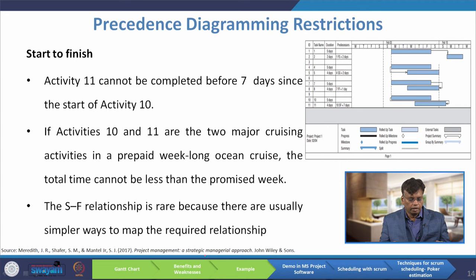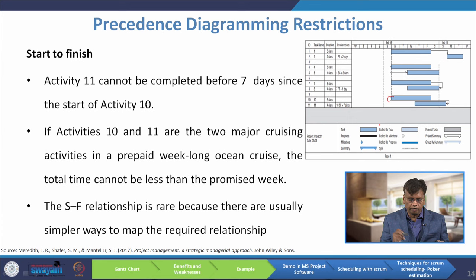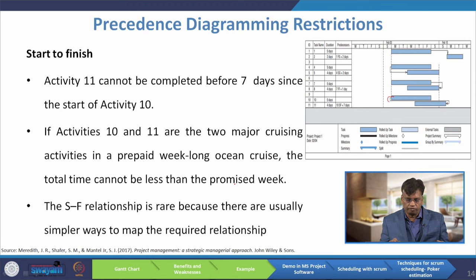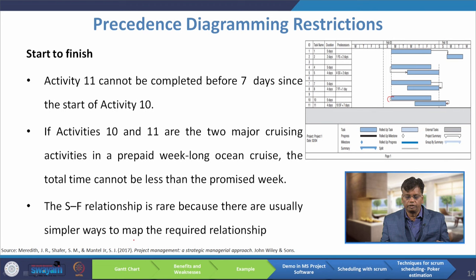The next relationship is start-to-finish. Activity 11 cannot be completed until seven days since the start of activity 10. For example, if activities 10 and 11 are two major cruising activities in a prepaid week-long ocean cruise, the total time cannot be less than the promised week. The start-to-finish relationship is rare because there are usually simpler ways to map the required relationship. These are the four precedence constraints: finish-to-start, start-to-start, finish-to-finish, and start-to-finish.